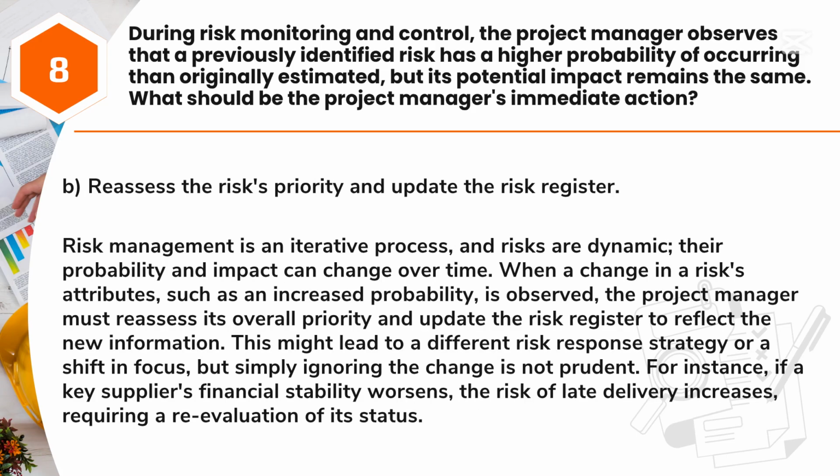Answer: B. Reassess the risk's priority and update the risk register. Risk management is an iterative process, and risks are dynamic. Their probability and impact can change over time. When a change in a risk's attributes, such as an increased probability, is observed, the project manager must reassess its overall priority and update the risk register to reflect the new information.